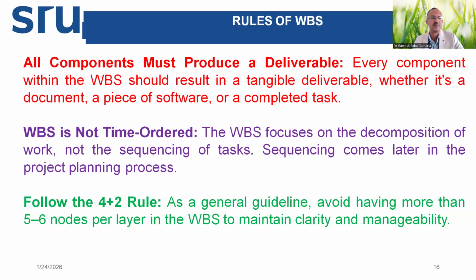Another important thing is that WBS is not a time order. In the diagram, we divide based on the main elements of the system, sub-assemblies, micro and nano level assemblies and components only. So it need not be time order. When we say first sub-assembly, second sub-assembly, third sub-assembly in the WBS, the third one need not come after completing the second one.